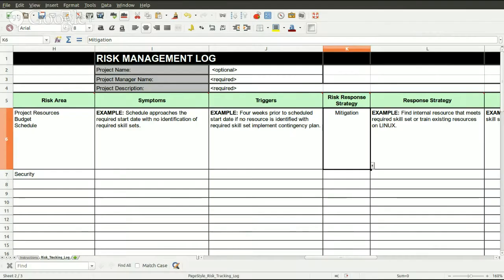Okay. And then you have transfer. Transfer is another kind of risk response. So you're in a group, and maybe your group is responsible for designing the user interface for the actual application. And you realize that the risk is not really associated with you, so you transfer that risk to another group that it is associated with. Maybe you're strictly focusing on UI stuff. You're like, okay, we're doing the UI stuff, but we don't really control where passwords are stored. So we're going to send it to the group that is actually in charge of where data is stored in a particular application. So that risk is no longer yours; it's transferred to another group.